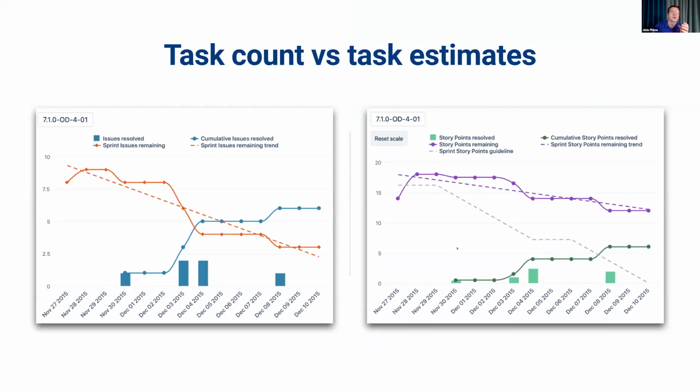And you can see in those two examples showing the same sprint burndown by issue counts on the left and by the story points on the right. The lines usually take a similar shape, but having estimates is what adds a bit more precision to the burndown. As we can see here, the burndown by issue count on the left shows a bit optimistic picture than on the right side by story points. Well, because as usually, less complex tasks are completed already, but more complex still pending.